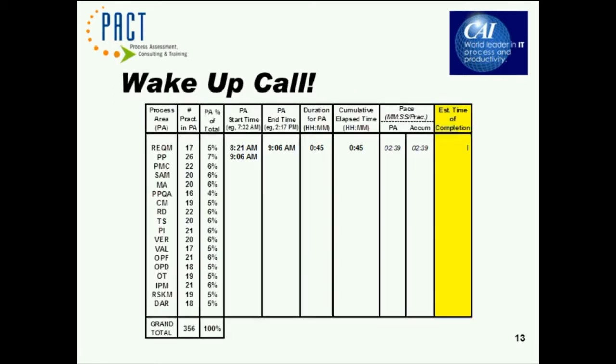And I pop that into this handy-dandy spreadsheet, which, if you look at the first line, says requirements management has a total of 17 practices, which is 5% of all that we need to cover today. We started requirements management at 8:21 in the morning. We finished at 9:06, meaning that we invested 45 minutes in discussing those 17 practices.